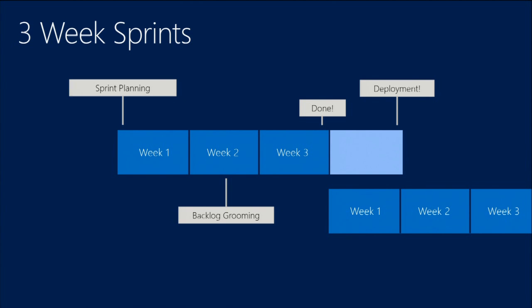And then testers are actually great. They say, look, what happens with this? What happens with this? And we actually make the spec better and better. And my goal is that they've seen it twice before sprint planning. So it's rolled through two grooming meetings before they see it in sprint planning. A lot of the teams that are really good about that, I think, are more successful.